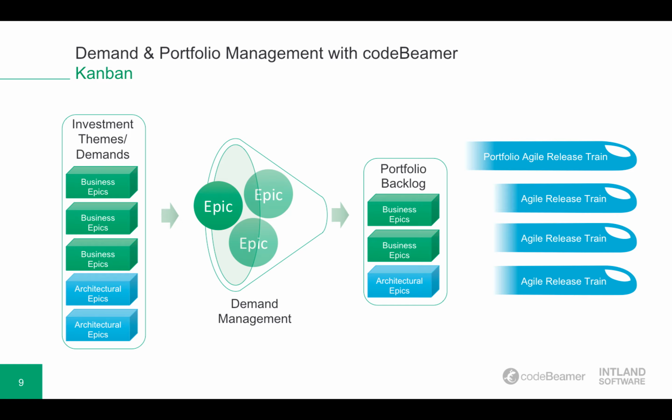So to ensure coherence at the portfolio level, Dean Leffingwell describes the so-called business epic Kanban system workflow to limit the amount of portfolio level initiatives and make sure that the trains are focused on those initiatives together. And after that, the epics need to be analyzed. In the analysis, you have to measure work and track work through the analysis process with business analysts and system or enterprise architects to understand what the impact of such an initiative might be.